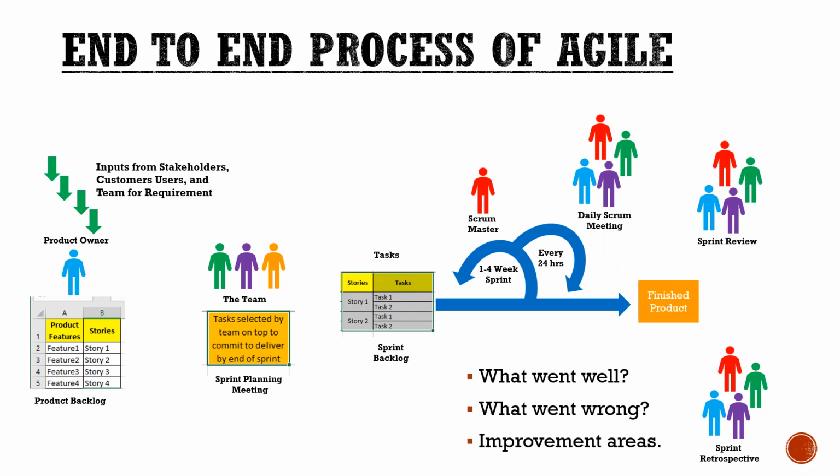So then what happens after the daily meeting and everything, and we are at the end of the sprint activity, we have completed the sprint. Based on that, we do a sprint review. In a sprint review, we look at what are the things we have completed in the sprint, and what we have finished. In the previous slide we discussed what the definition of done is.